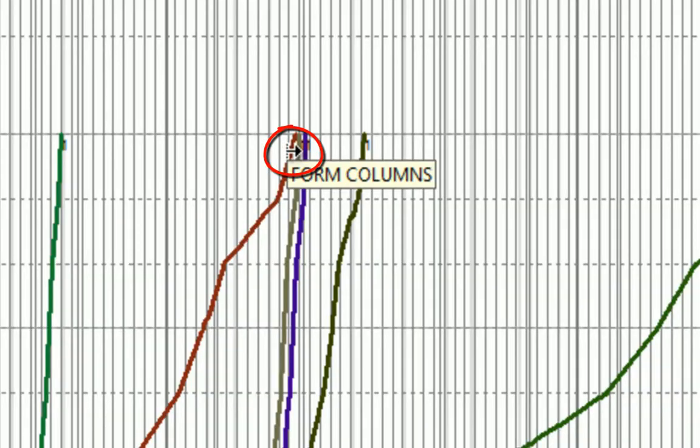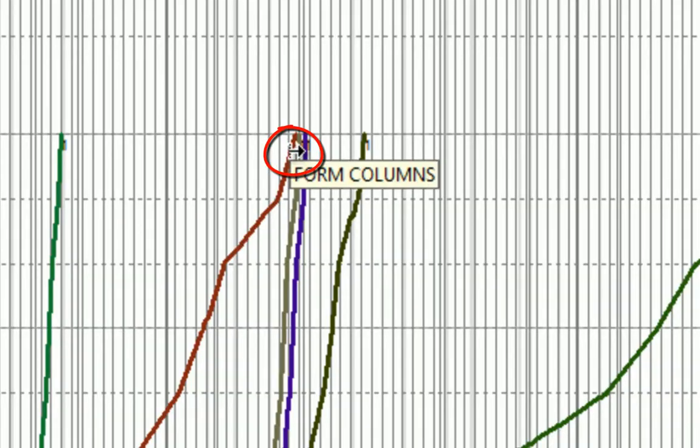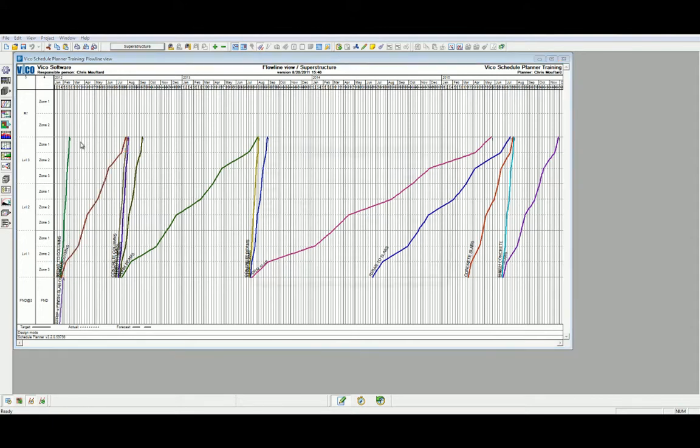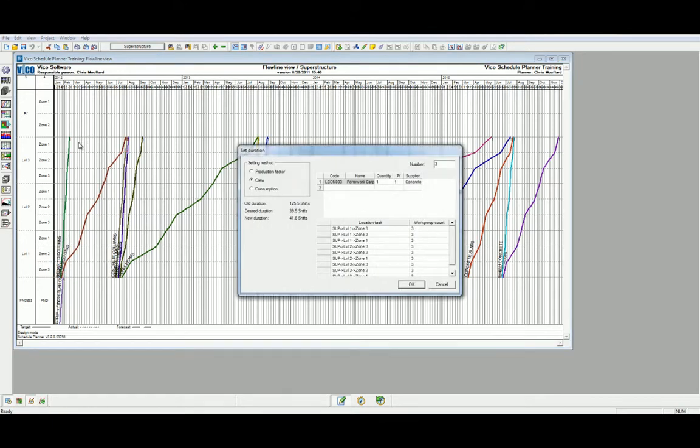We must first start by hovering a cursor over the task line until you see the single arrow. By left-clicking and holding and dragging the line to match the slope of its predecessor and successor and letting go, you can note that the Set Duration's dialog has opened.